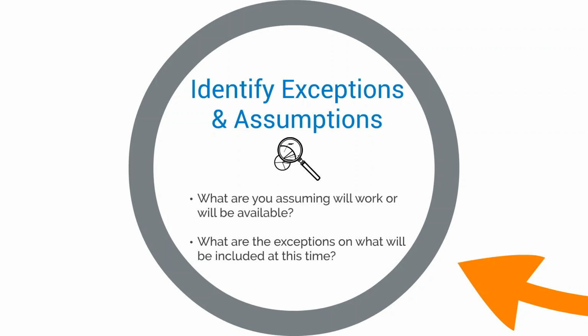If that's the case, then it is possible that you will need to put that in as an assumption that you'll be able to connect to that data source and that you'll be able to have someone who knows which information you need to pull from that data source, who can define the columns and maybe make a view for the workflow to be able to use. So if your process depends on a data source, a lot of times that comes in as an assumption that that data source is available.